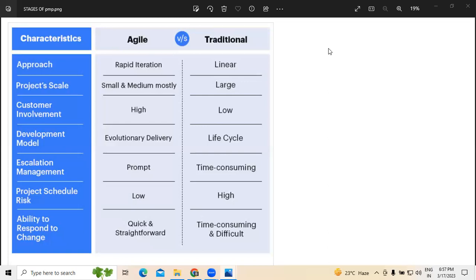But actual capacity depends on the people's availability. For example, some people are available for 10 working days. Some people may be available for 9 or 8 due to their personal reasons. So sprint to sprint availability of the people, based on that, the number of working hours the respective team members will be attending will be different from the maximum capacity. At the same time, that completely impacts the number of user stories we have covered in that particular sprint. So these are all something like chain linking kind of stuff. When I'm explaining capacity planning, velocity and all that, I'll explain the detailed part there.